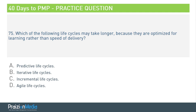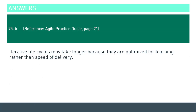Number 75. Which of the following life cycles may take longer because they are optimized for learning rather than speed of delivery? The best answer to this is Iterative — option B. Iterative life cycles may take longer because they are optimized for learning rather than speed. Agile Practice Guide, page 21.